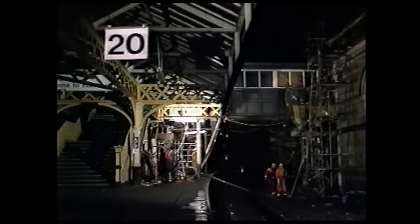At Newcastle, the famous diamond crossings were gradually removed over a succession of night and major weekend operations. Temporary track work had to be installed to allow services to continue without interruption. The creation of an island platform and the new junction layout enabled the separation of mainline and suburban services and removed conflicting train movements and their effect on timekeeping.